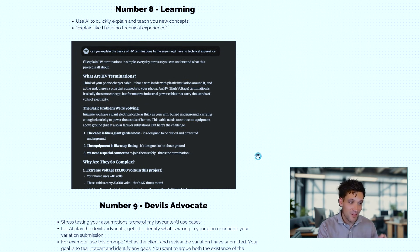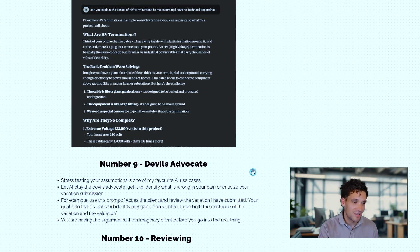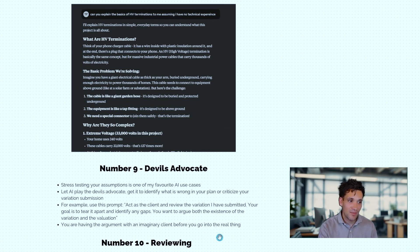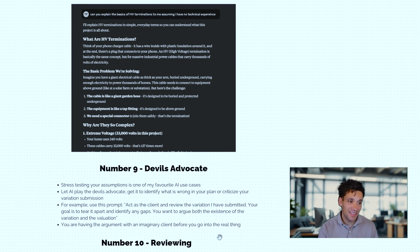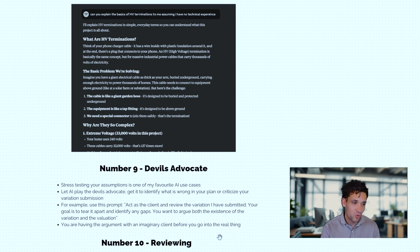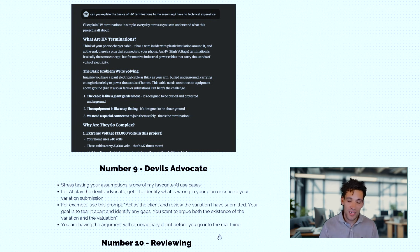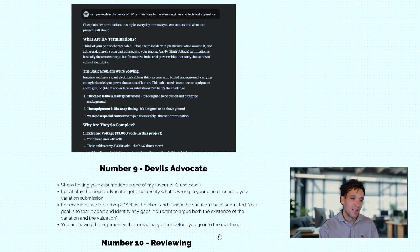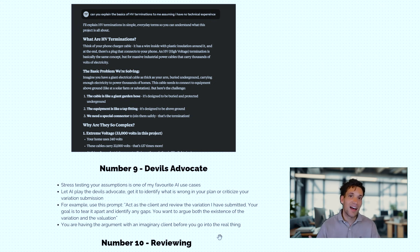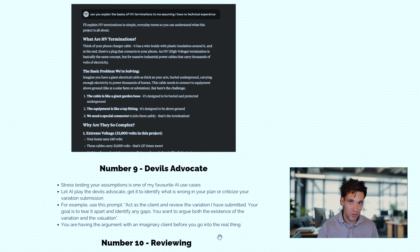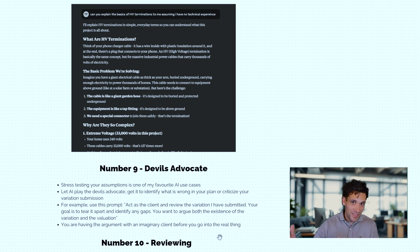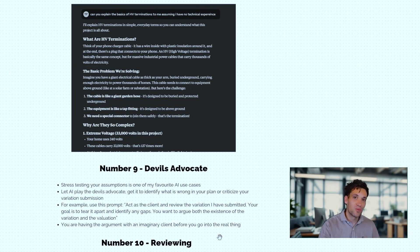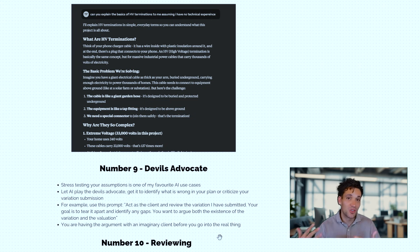The next use case that I've been playing around with a lot recently is getting AI to play the devil's advocate. What I mean by this is basically using it to stress test your assumptions or the work you've created. Say, for example, you're submitting a variation to your client. You want to claim extra money for a delay that they've caused. You can use AI to help basically take on the role of your client and ask it to pull apart the variation and be hypercritical of it. And then rather than having to go through that with your client, go through it with the AI first, make the improvements before you submit it to your client.